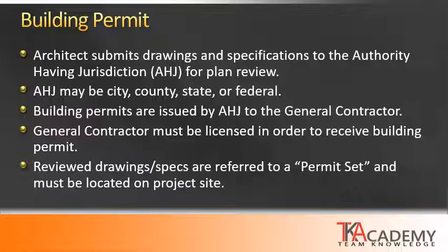Architects do not receive building permits. Building permits are issued by the authority having jurisdiction to the general contractor. So typically the general contractor must be licensed in order to pull a building permit. This cannot just be anybody who wants to self-perform the work. They actually have to be licensed in order to receive the building permit.